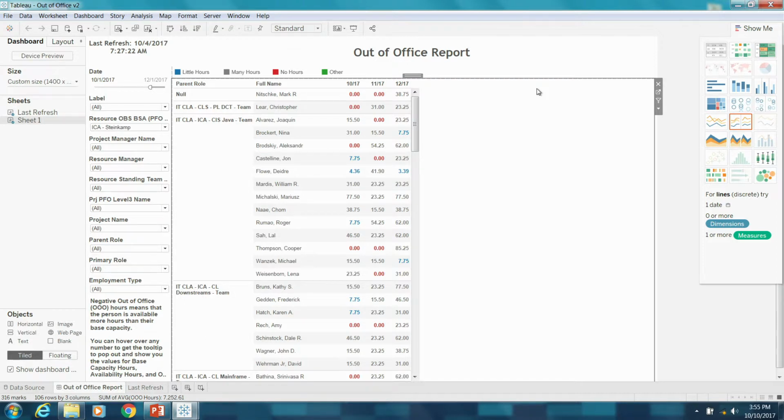So typically, any full-time associate is working 160 hours a month. Typically, people take off a few days, a few weeks, November, December for holidays. But if you don't indicate that in your calendar, it's going to say you're available for 160 hours. You're going to be allocated to your projects for 160 hours. The cost for that project will be artificially high because you didn't indicate that time off in your calendar.